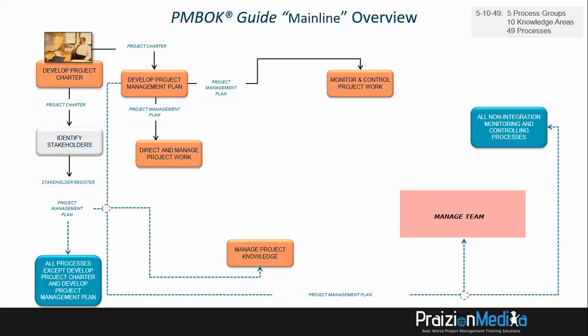For example, there is a direct link between monitor and control project work and manage team. What is that direct link? Work performance reports is an input to manage team. And there you have it, a connection.